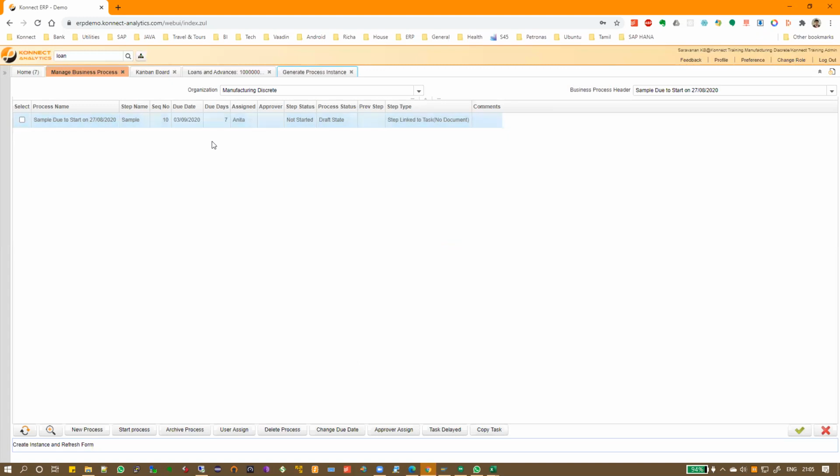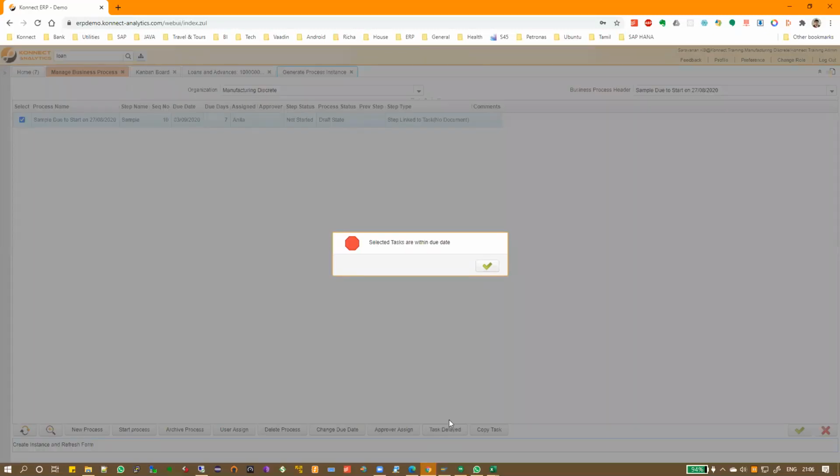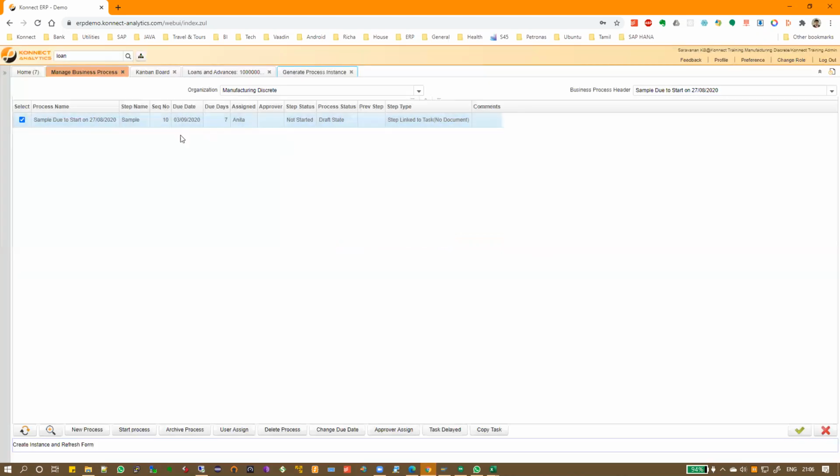Okay. So what can you do? You cannot do anything, right? Because some people need to have tracking. Either you can reassign the user to somebody else and ask them to do it, but then it's not fair for them because you don't know the due date. It's very close to the due date. So what you need to do is you need to select this task and say this task is delayed. Okay. Again, it's an error because it says still within the due. How can it be delayed? So any task which has crossed the due date, you will be able to delay it.